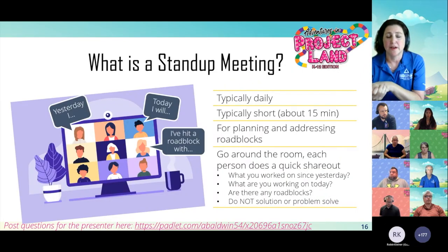Let's talk a little bit about a stand-up meeting. For some projects or some portions of projects, you might decide that you want to do stand-up meetings. For example, perhaps you're now in the testing phase of a project and there's a lot of new information popping up, and it's just more effective to get together to plan and address issues in a daily 15-minute stand-up. So that might be helpful.